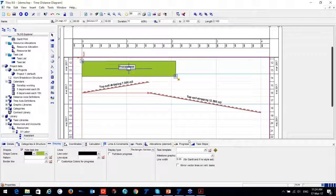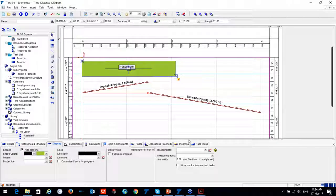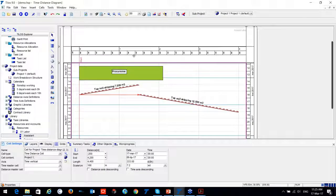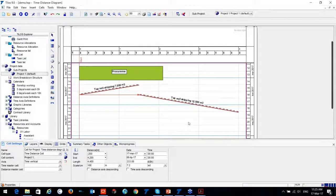A question about whether multiple people can update their respective activities on the same project from different machines. Currently the enterprise multi-user model is not yet active but is under development. As a workaround, you can divide the project into two sub-projects, have each person update their portion, then combine them using the sub-project feature in TILUS to create one master plan.